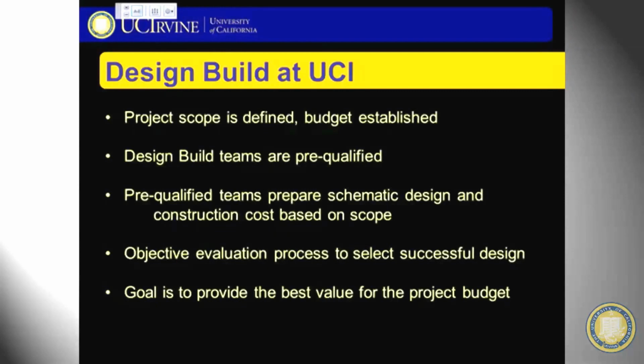Once their proposals are complete, we evaluate them in a kind of blind process. The evaluation team does not know who they're reviewing, and it's as objective as it can be. And at the end of the process, we come up with a design that has the best value for the university as opposed to the lowest cost.